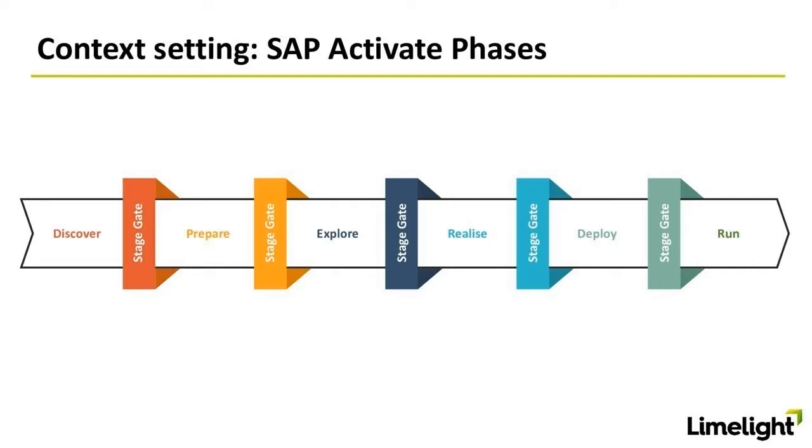From the left to the right, very quickly, discover and prepare are two early phases that you get into, which set the foundational aspects of the program in place. So make sure that the scope, the plan, the budget, the business case, and ultimately the board sanction is in place to proceed. And then when you move into explore, is all really around design.